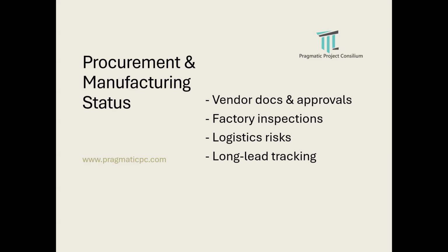shipped. Because some items cannot be shipped easily. They might come in break bulk, or they will have special logistic requirements. If it is moving on road with large trailers which are very long, it requires special permits like police protection to move from one state to another state, one emirate to another emirate. So what are the long lead items and what is the tracking on them?